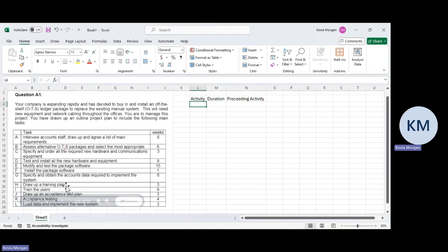So for instance, maybe you can say you want to complete your paper totally before you start working on the presentation. Or you can say you do the basic structure of your presentation, and then from that structure, you complete the paper. It's up to you, whichever way you think your resources will be best used. So after we have all of the tasks, then again, we put it in order, and based on the order we've chosen, we say which activity comes first, second, last, etc.